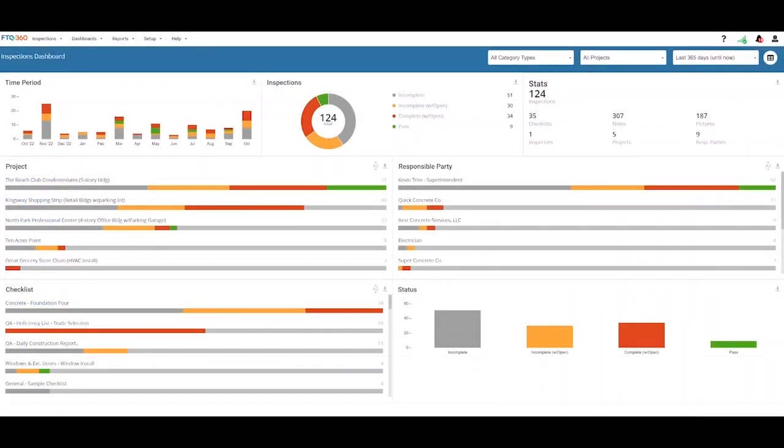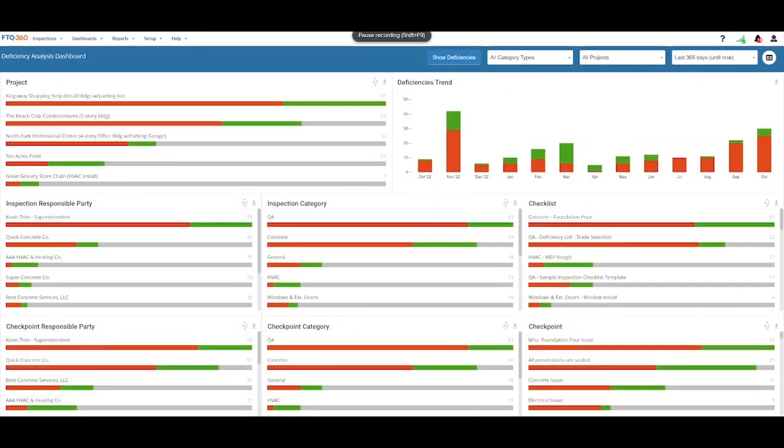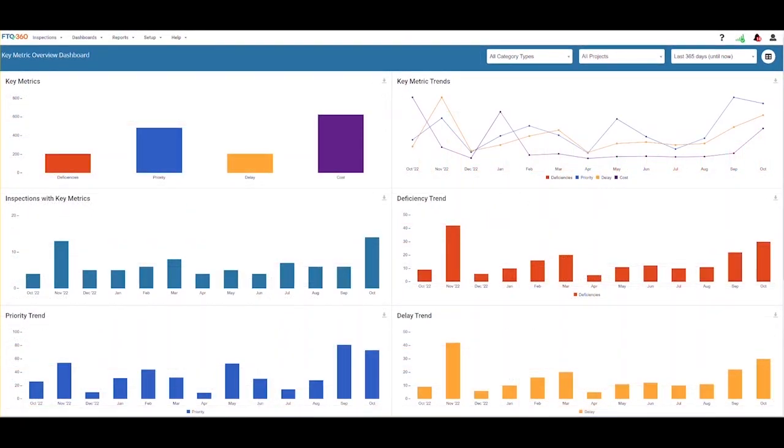Subcontractor meetings sound like this. You had 46 issues on the last 92 jobs, with properly sealing the penetrations occurring the most, accounting for 17 of those issues. Why do you think your crews are having a problem with properly sealing penetrations, and what can you do to alleviate that? The analytics in FTQ360 are giving the company an edge to target problems that are costing cycle time, wasting money in rework, and eating up the superintendent's time on the job site.